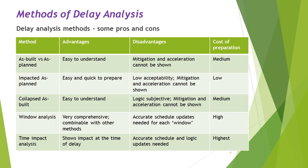Next, looking at Impacted As Planned. This is again very easy and very quick to prepare, and therefore has the lowest cost of preparation. That said, it has low acceptability in dispute management, and similarly, mitigation and acceleration cannot be shown.